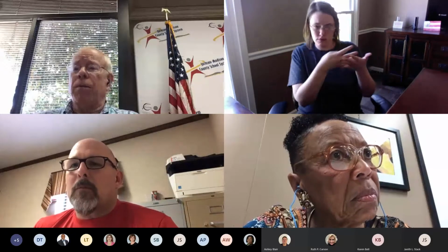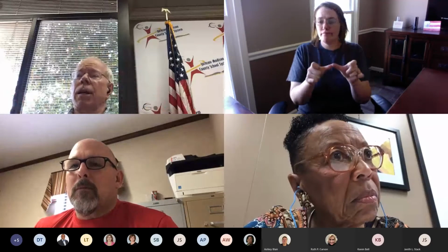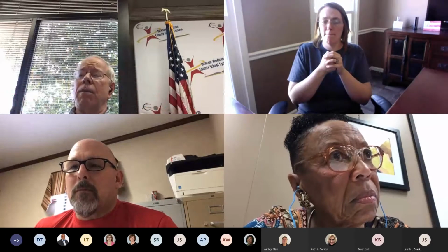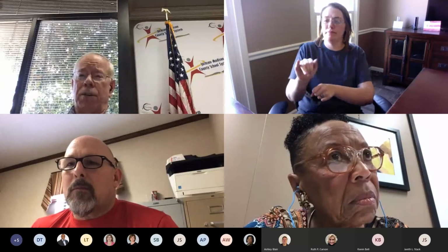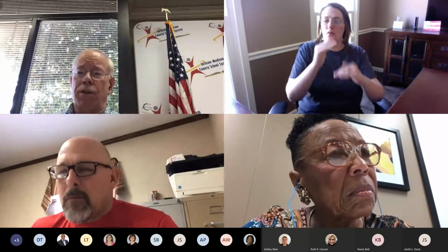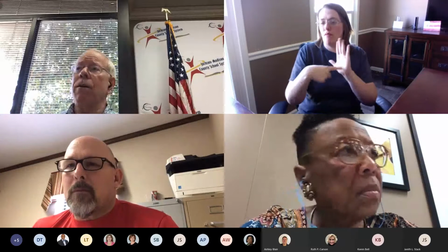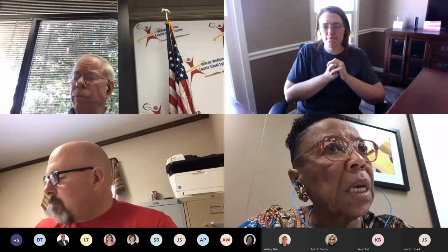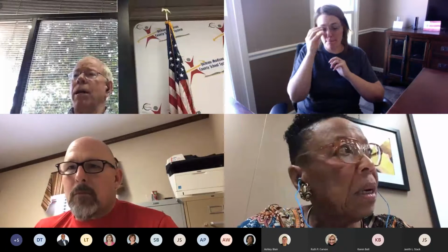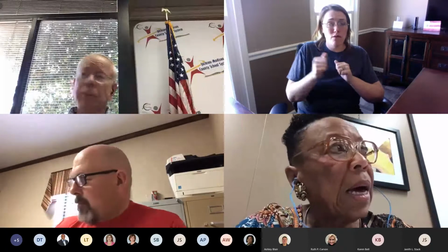And that keeps you from getting to the bid document phase, and then all of a sudden the bids come in and they're substantially over what you can afford. So this makes a lot of sense, Dale, the way you've got it set up. Okay, any other questions for Dale?